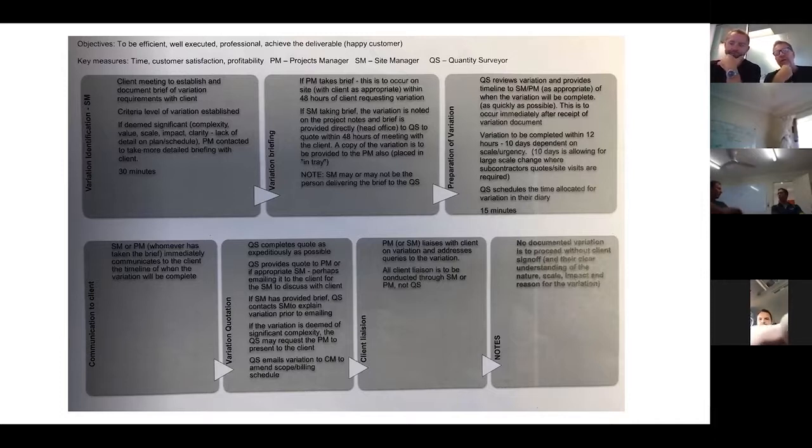Yeah. So one of the big key things, Greg, is that relationship between you and your architect. You don't make it adversarial. The key is to figure out, great, well, for me to do that, it's going to take an hour for writing up each one each night. When you want that done, we're going to be putting in overhead recovery margin. We're going to be putting in a project management fee. We're going to be putting in extension of overheads. So for the jumbo bin, if it needs to be on site longer, if we need Portaloos on site, if we need to extend our contract works, this is going to become very expensive for us, but we're happy to do it.